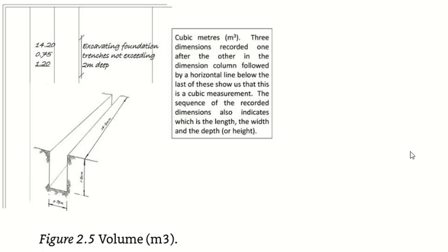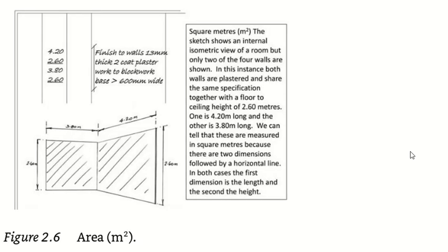So where it comes to the standard method, we follow it blindly. You don't say that since I wrote 1.2 meters already, people will know it is less than 2 meters. No, we will write it, because it is written in the standard method. Got it? Clear? So even if you see a conflict, you will follow the standard method.